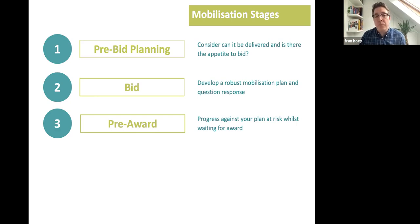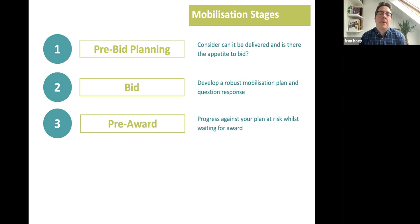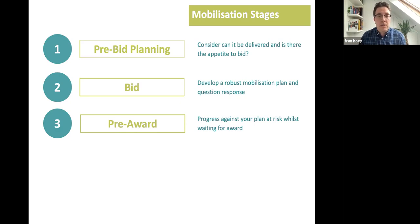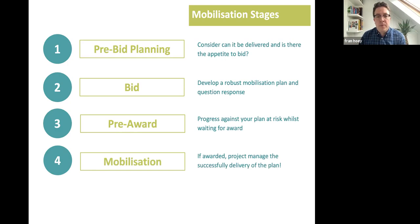Then you get to pre-award: once you've submitted your final offers, there's a period where you don't know whether you've won. Cash-rich organizations will take advantage of that period to really get ready — working through different award scenarios, getting governance up and running, clearing critical milestones, starting work on IT solutions and recruitment. That pre-award period is really important; if you're on the back foot during that time, it's going to be a challenge to get back on track given the short timescales.